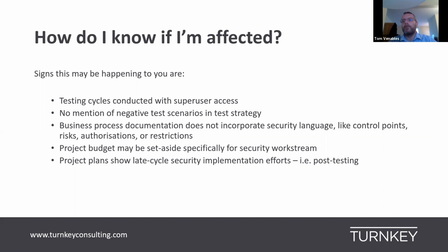You might see within your budget or your project planning that you've not set aside any specific budget to deal with a security work stream or security objectives within the functional work streams. And you might not see any early cycle security objectives within your project plans. You need to expose those, not just from a business risk perspective, but also from an IT general controls and integration point of view.